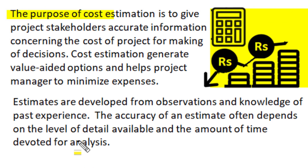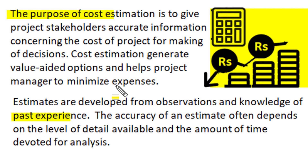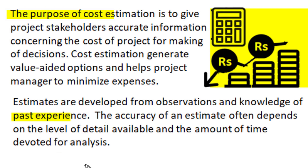Estimates are developed from the observation and knowledge of similar types of projects executed previously. So estimations are based on past experience, and the accuracy of any estimate often depends upon the level of detail of the project available and the amount of time devoted by the project team on planning and analysis.